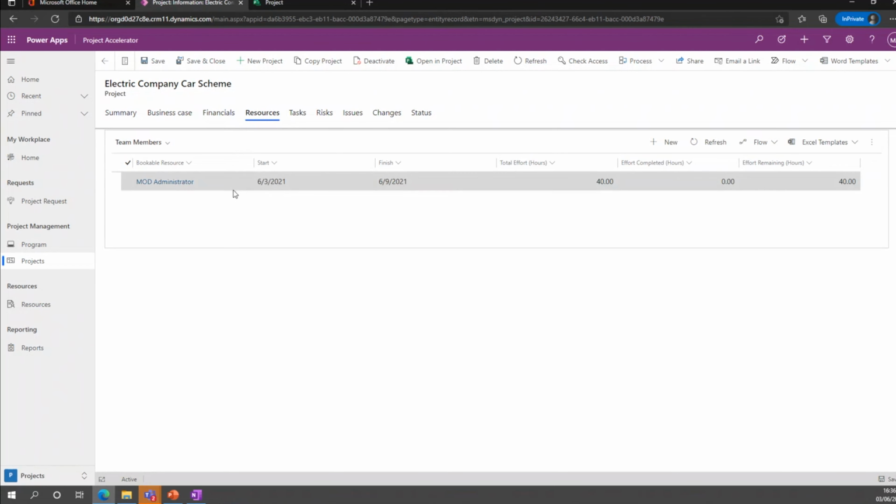So resources in here. I would say limitation is a strong word, but it's simplistic for resources at the moment. It doesn't do activity tracking. You can do task tracking, but you can't do assignments. If you're used to using Microsoft Project Desktop or Project Online, where you've got tasks, and underneath the tasks you've got assignments, you're saying this task 25 to go and deliver this thing or build this thing or complete this activity has 2 people on it. That person's 10% of the time. That person's 20% of the time.